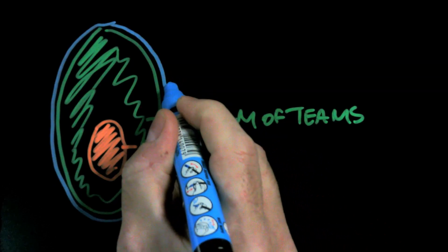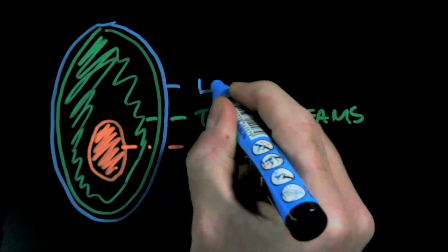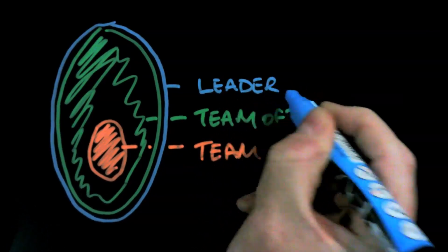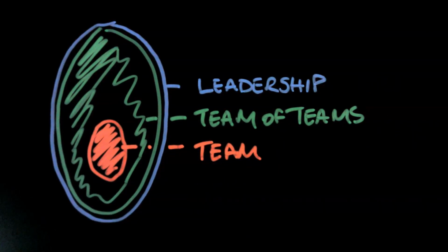The third level of escalation in your impediment is this leadership team level of impediment. This is where you may need to change a team structure, or introduce a new team, or perhaps think about changing a company policy, or getting a greater level of delegation than what you've had before. This is kind of the highest level that you can go to. So if you set your structure up in these three layers, you can get through any escalation of impediment that way. So how do you manage through that?